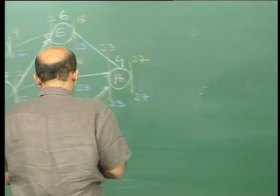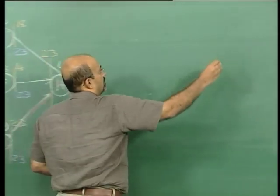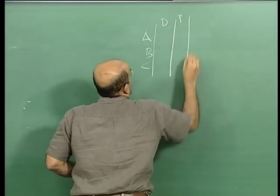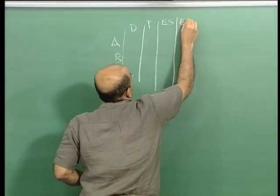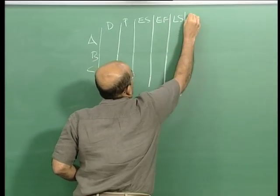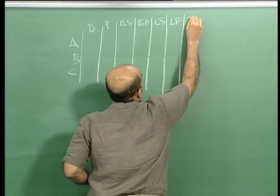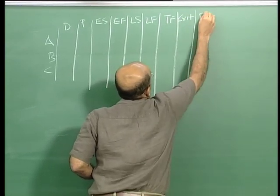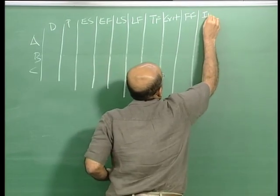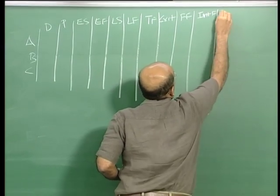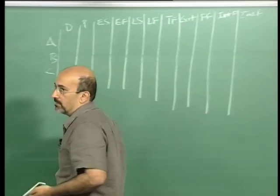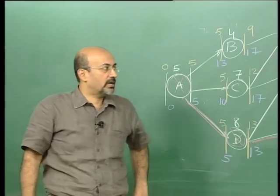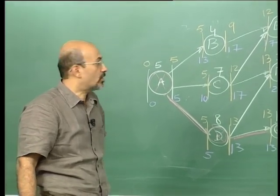You can make the table. We will finally put this in a tabular form where we have A, B, C, D, the duration, the predecessor, early start, early finish, late start, late finish, total float, criticality, free float, interfering float, and independent float. So this will be the table. Once you have done the basic analysis, it gets you back into thinking in terms of the forward pass and backward pass. Let us then discuss the floats.